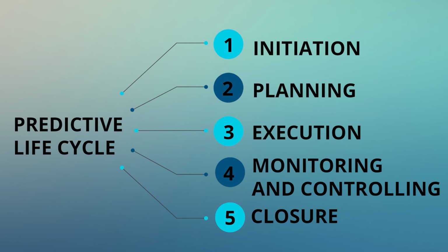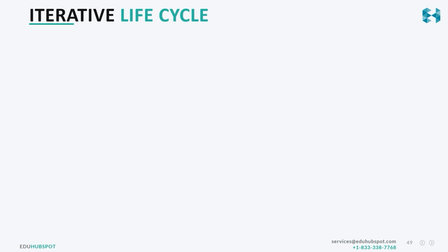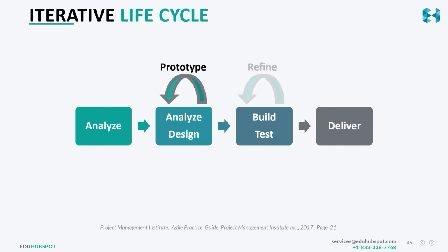Remember, when your requirements are fixed, you will always go for the predictive life cycle. Now next is the iterative life cycle. In the iterative life cycle, I'll give you one example.